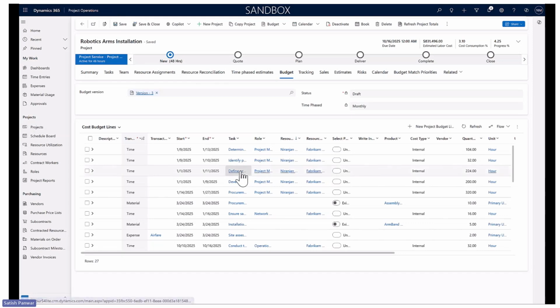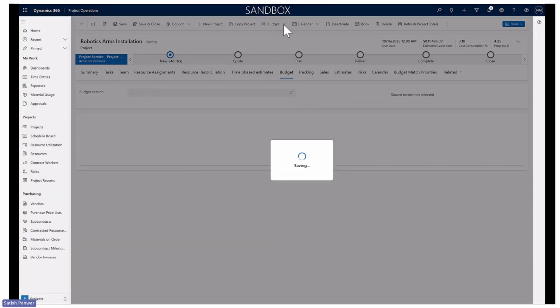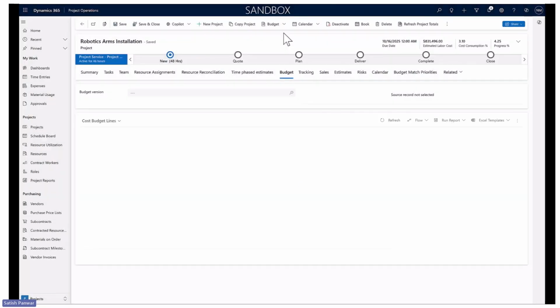Once the budget is revised, you can see version 3 is created. Earlier it was version 2. You can see the different project scope start date and end date has been increased from 1/9 to 1/11, considering both the actuals which were missing to be accounted for against this different project scope budget line, because they are beyond the start and end date of the project budget line. Let us submit this budget and also get it approved. Let me submit this, and it will take some time to get approved. Let me click approve and move to the next topic.